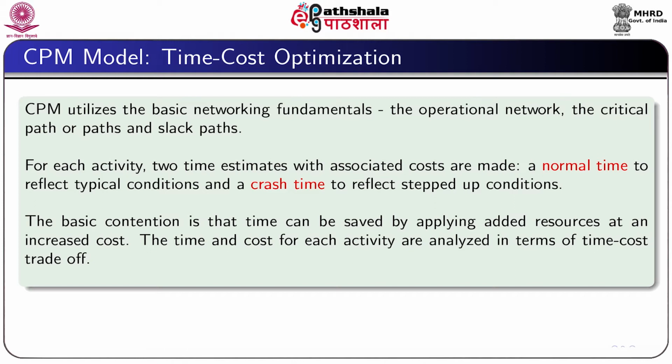A normal time reflects typical or normal condition, whereas a crash time reflects stepped up condition. The prime objective is that time can be saved by applying added resources at an increased cost. The time and cost for each activity therefore need to be analyzed in terms of time cost trade-off.